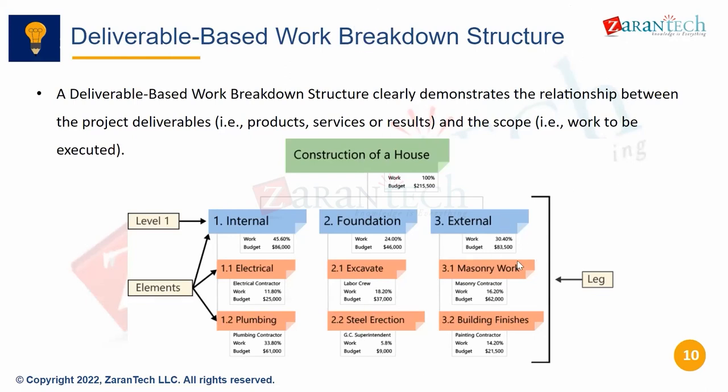Then in the realize phase, we have configuration, custom developments, and testing: unit testing, integration testing, and UAT, let's say, user acceptance testing. Then we also have data migration in that, let's say. But then in the deploy phase, we have cutover, then we have post go-live support. So that is how we'll break it up into the WBS structure for an SAP project from the deliverables point of view.